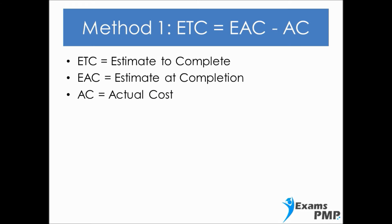The first method to calculate ETC is to use the formula: ETC equals EAC minus AC, where EAC stands for Estimate at Completion and AC stands for Actual Cost. In plain English, what this formula is saying is that the amount of money needed to complete the project is equal to the total budget minus the cost accumulated so far.